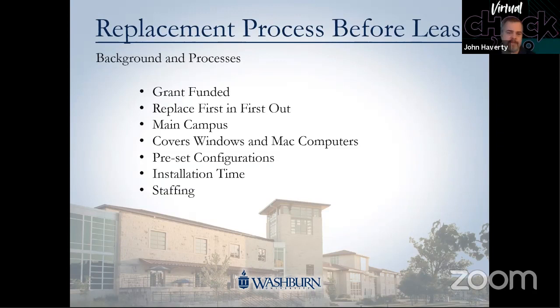We were doing that. Again, we tried to set a threshold, kind of a budget line of how much we knew we were going to be using each year and what we'd have left over so that we could use it for other items. Installation time, as I mentioned, we'd usually try and do this between, say, July and December, have everything installed. The target was to have it done by December, as I'll cover when the computers arrived on the lease. We didn't always meet that requirement. Usually it was because of changes from departments, but I'll cover more of that here in just a little bit.